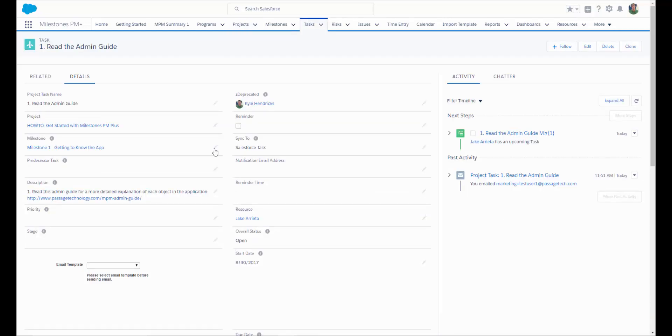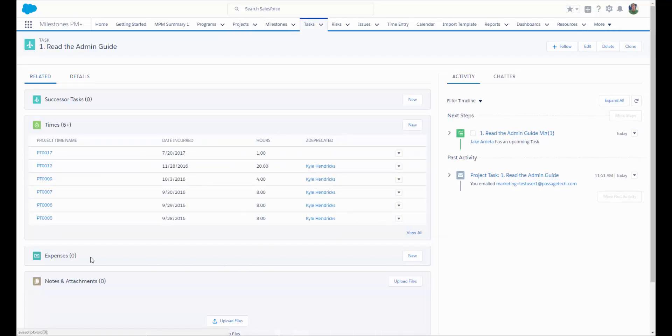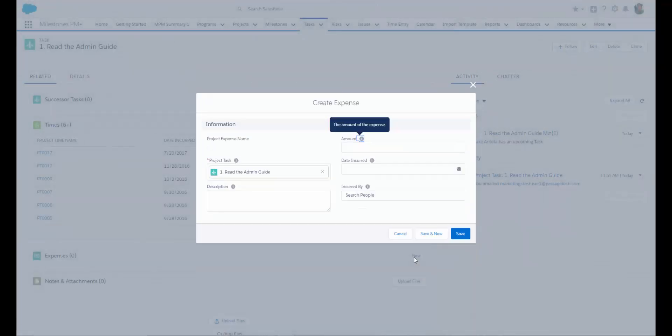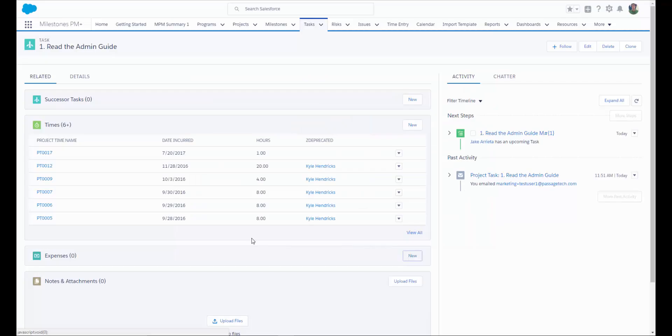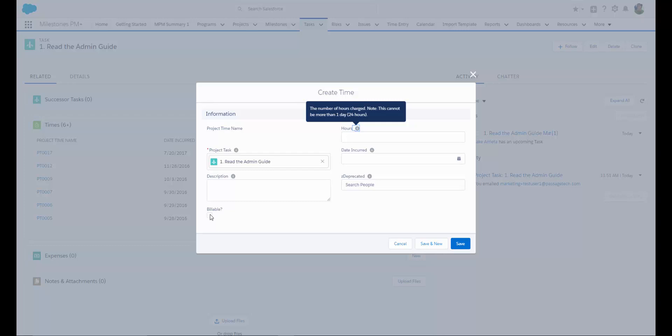Back on our project task, if we click on Related, we've got the ability to track expenses against any project tasks by simply clicking New. And in the Free Edition, you can also log time against your project tasks by clicking New on Times. I have customized this in this org. I've added a checkbox for Billable that a user can manually check. I've also added a formula field to help identify whether time was billable or not so that I can roll up billable versus non-billable time to get a better overall picture on how we're doing with our time against our projects.